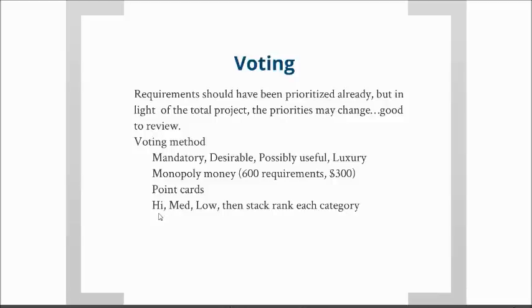You say, okay, what is the most important high on here? And if you need to go through another round because you have so many requirements, you say, okay, this high is a high number 1 and this is a high number 2, and you go through and you stack rank those. It just makes it more manageable.